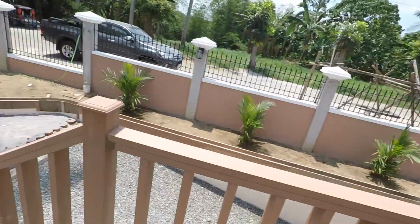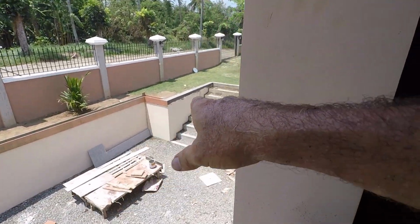So I just wanted to see what was accomplished this morning. The driveway, I got the driveway all the way to where the drain is, right here. Now I need some more sand. The wind is picking up right now, so I'm trying to get out of the way. There is barely enough sand, if enough, for them to make up the concrete mix for the top of the retaining wall. I hope we have enough for that. I notified my builder several days ago to make sure that we don't run out of gravel and we don't run out of sand, because the driveway is a big project for sand, and the retaining wall is a big project for sand and gravel to finish with that. So that's part of project management.